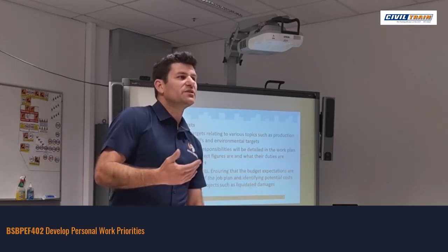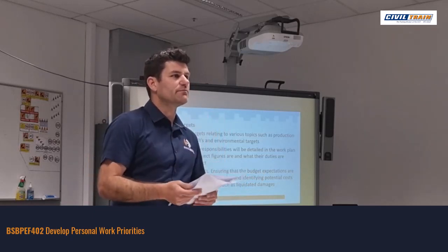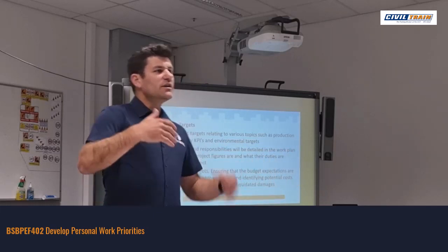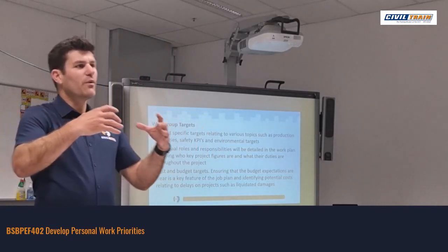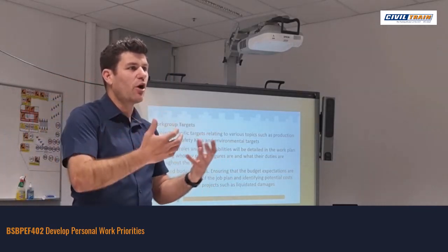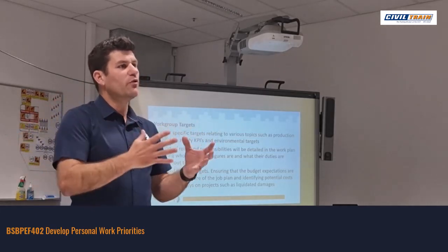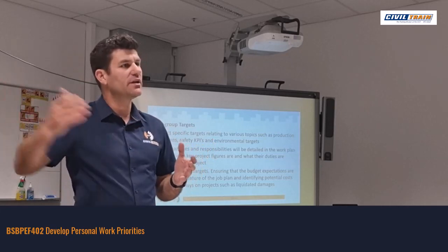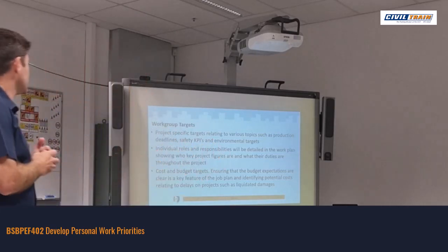So what I would probably see in your work plan is that you would need to order your concrete probably 2 days prior, or I'd like to see that you're thinking about what's happening next. So in your personal work plan, what we're going to be getting you guys to do is put in potential notes of how you would plan for that project. So the week before, we'd like to see notes of what's happening the following week to ensure that you are planning for those activities.